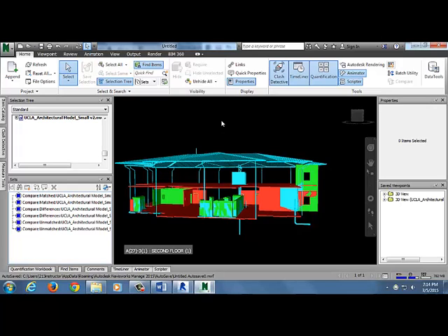How is that going to affect things? For example, with your version 1, you did the takeoff, you did the price, and then something happened, the owner changed it. How is it going to help if you forget about version 1 and do version 2? Well, you do your export, right? You did your version 1 takeoff, and you exported that to Excel, and then you put that into your estimating software, whether it's Excel or some other software.